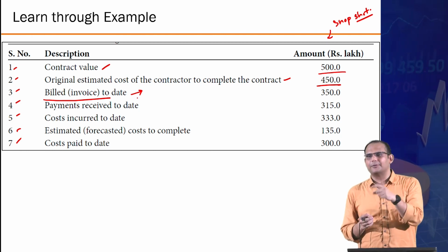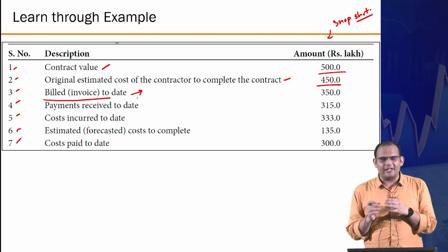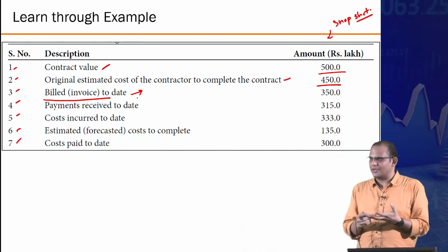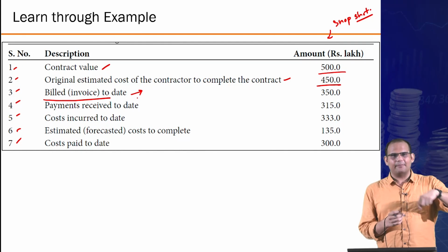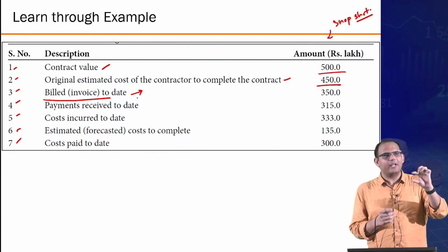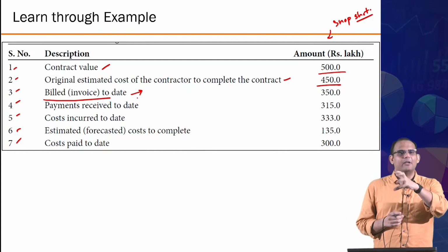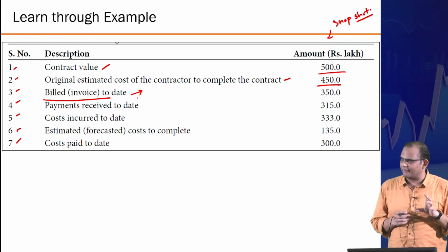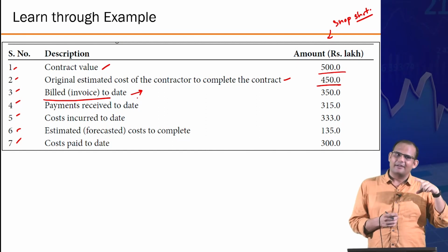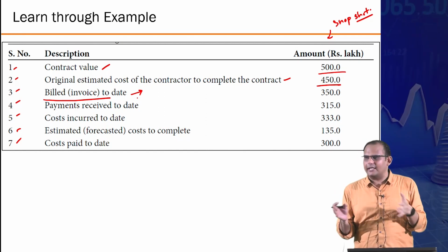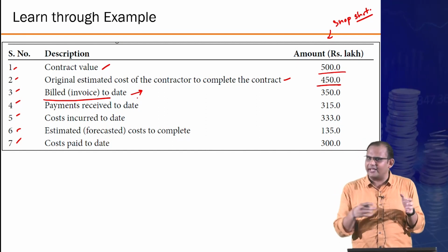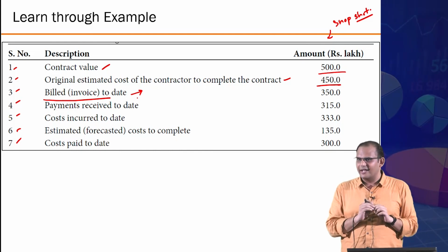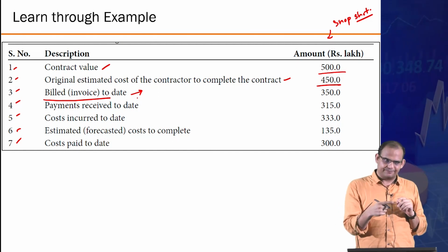Even in a day-to-day thing, you don't realize it, but even in IIT, when we have to procure something, we first ask them to give a quotation, right? Quotation is their estimate of this much money they will require to complete a particular task or whatever the services that we are asking. Based on that quotation, we agree that, okay, this price is okay for us, and we give them a purchase order, which is essentially, okay, we agree to buy on this condition. Then they raise an invoice.